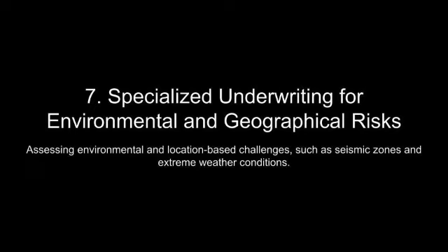Backlog reports quantify the value of uncompleted projects, serving as an indicator of future revenue potential. However, an excessively high backlog relative to available resources can signal overextension, risking delays and quality issues. Conversely, a shrinking backlog may suggest declining demand or inefficiencies in securing new projects.